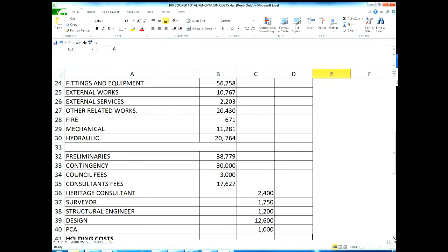I would imagine that he would have probably about 7% in that 38,000. I should have really asked him, but I think that given the condition of the house we need to add some more, so I've put another 30,000, so basically another 10% in.